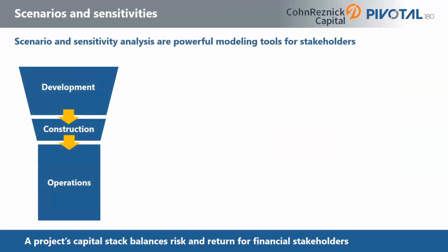Well, great. I'll move on here to the next slide. Scenario and sensitivity analysis. And this is where advisors and investors spend most of their time in the financial model. Scenarios are potential choices or outcomes resulting from decisions made by stakeholders. Scenario analysis requires changing all the input variables at the same time. Early in the life of a project's development, there's a lot of uncertainty on how the economics will play out, and therefore there are a lot of scenarios to analyze, and sometimes this can be even hundreds of scenarios.